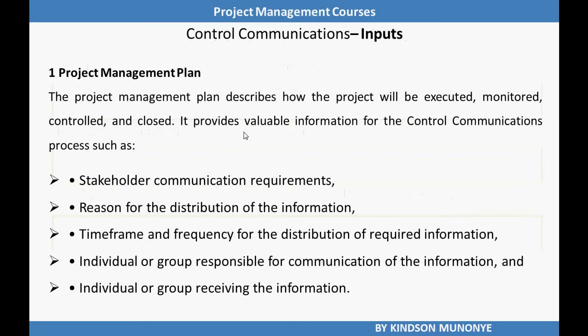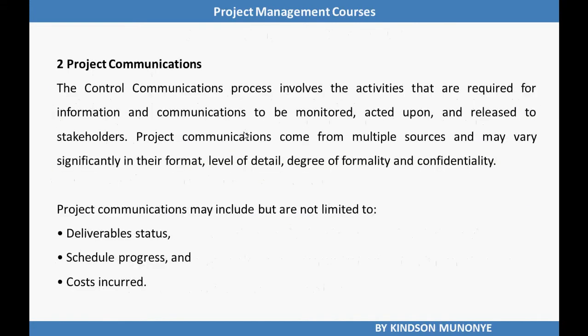It provides valuable information for the control communications process, such as stakeholder communication requirements, reasons for the distribution of the information, time frame and frequency for the distribution of required information, individuals or groups responsible for communication of the information, and individuals or groups receiving the information.